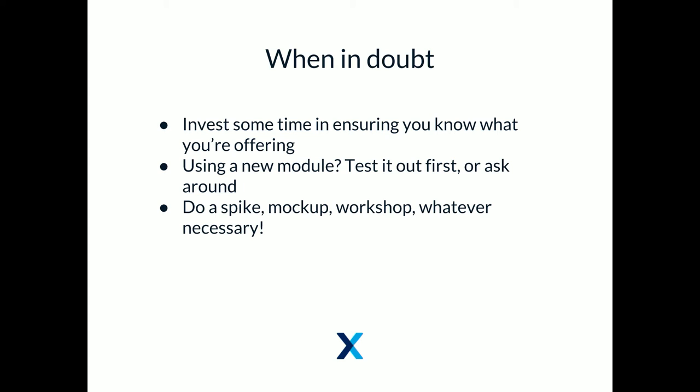That's totally fine. If you didn't already feel comfortable coming back to me and saying, I've never done this before, maybe you should ask someone else, or I've never done this before, can I spend a couple of hours on it and make sure that the approach I'd like to take will work? I say, absolutely, do it now. That's not a problem. You may find that you're spending time digging into estimates that then don't get approved, but it will more than pay for itself by avoiding that situation where we spent 60 hours and got paid for 5. We could have done a lot of spikes in that time to have avoided that problem.